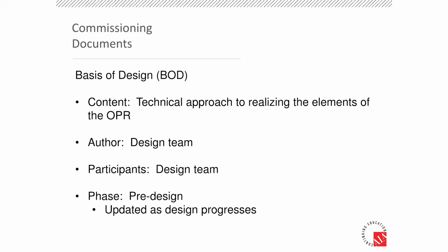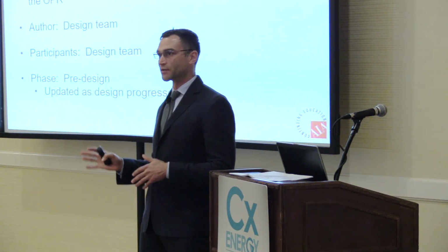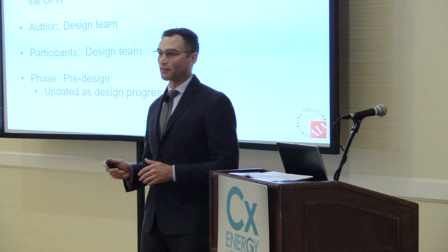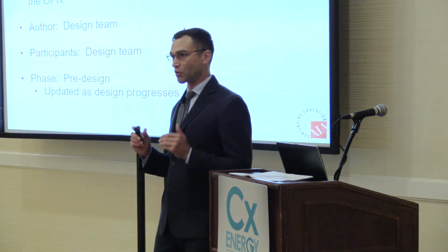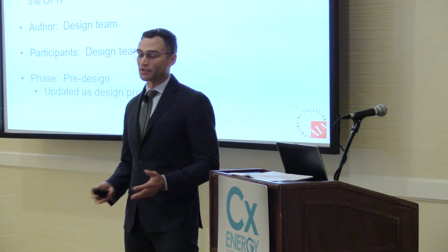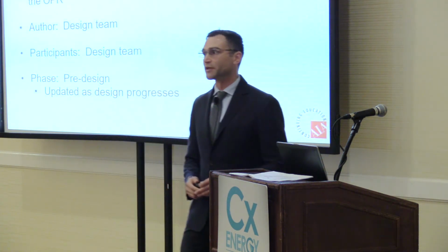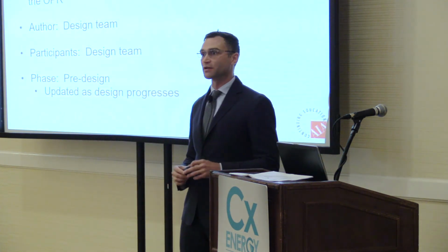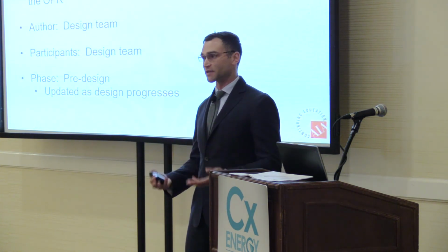BOD, another pre-design document. OPR information will transition into BOD information, and from there we start incorporating the owner's intent into design. How do we do that? The next step ideally would be to start including functional testing, the owner's expectations, and our expectations into the specs.